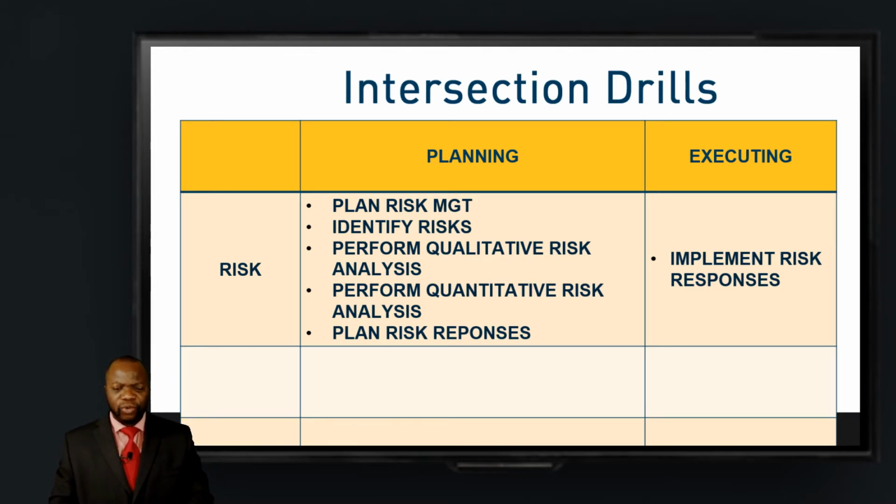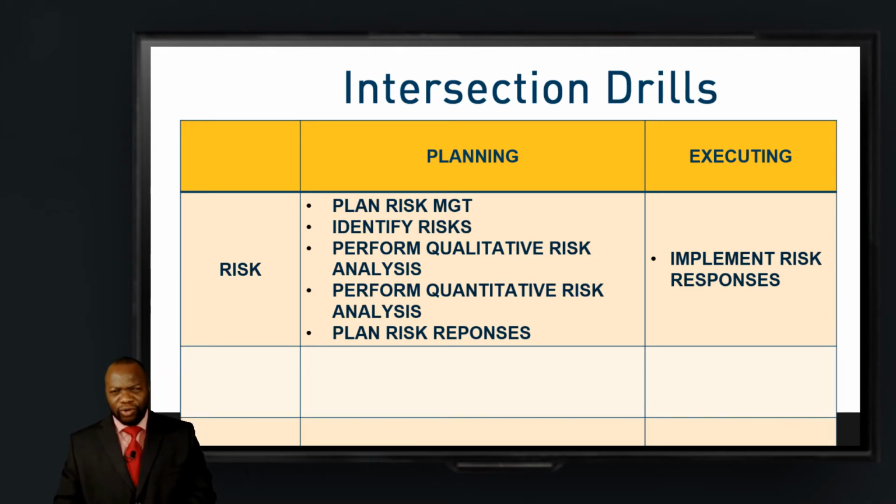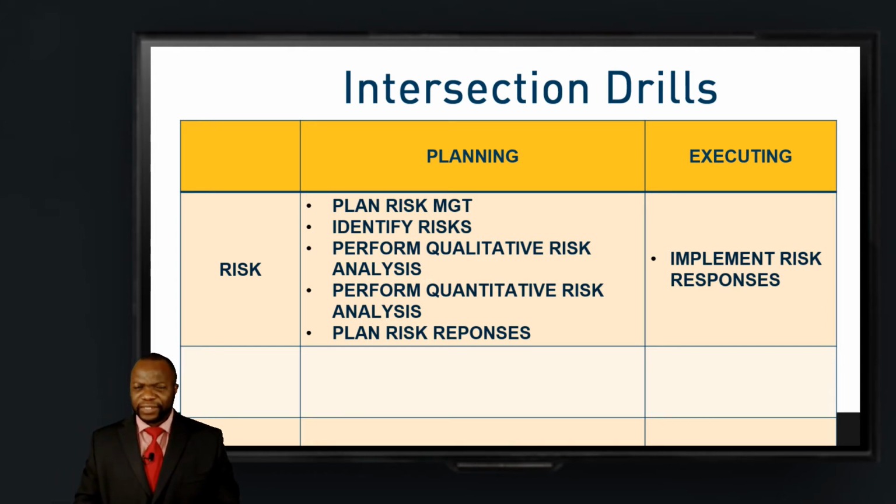Some intricacies to be aware of. Perform qualitative risk analysis is really more of a qualitative assessment of the risk without getting into specific numeric details such as currency and absolute percentages. No, we stay away from that, and we border more on qualitative measurements, like on a scale of 1 to 5, what would you call the probability, or scale of 1 to 10, what would you call the impact, for example. Perform quantitative risk analysis gets into the absolutes.